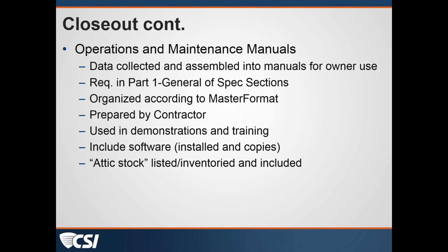And I think the key is that it's clearly spelled out in your general conditions or your supplementary general conditions as a requirement. I've had clients who, for example, tied their schedule and milestones, particular phase dates, in a similar fashion. And actually some that have required manpower-loaded, cost-loaded schedules, and then use those in review of the applications for payment if the project was perhaps not on schedule.